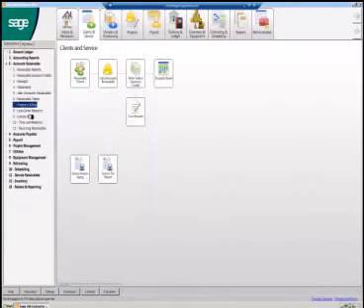Last one, or actually three more, I apologize. Loan draws: home builders that are dealing with banks that need a loan draw, we can actually do the loan draw. Very similar to the progress billing, but it's a loan draw. Unitized billings are more specific to the highway industry, where you're billing for the ton of asphalt or the cubic yard of concrete or the square foot of concrete curb or sidewalk or linear foot of curb, number of parking spaces lined, whatever. It's a unit price bill, and you basically just have units on there with a unit price.